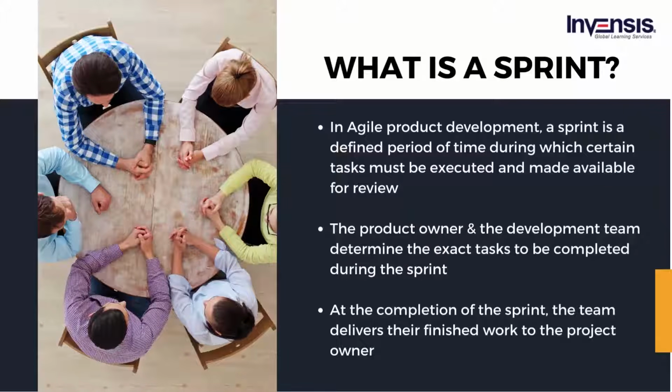After a sprint starts, the product owner must hand over control to the team. Throughout the sprint, the team has daily stand-up meetings to review progress and generate solutions for obstacles. The project owner may attend these sessions as a spectator, but participation is restricted to answering questions only. During a sprint, the project owner may not propose modifications, and only the Scrum Master or project manager has the authority to interrupt or end the sprint.